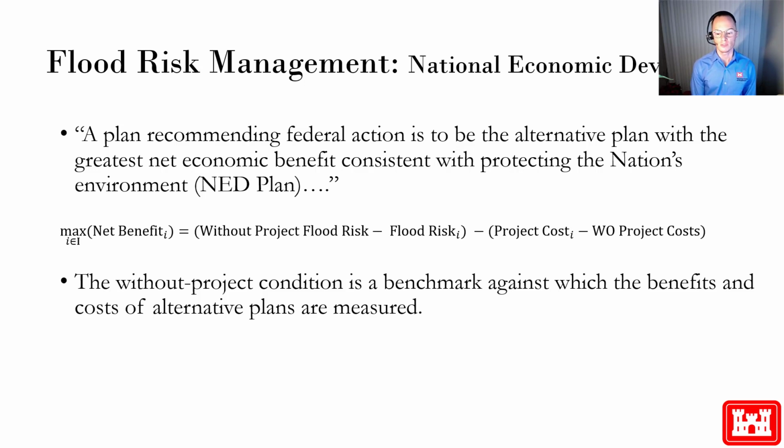In order to measure a reduction, we benchmark the benefits and costs of our actions against the no action alternative, which is the without project condition. So we have as our goal to maximize net benefits relative to the without project condition.